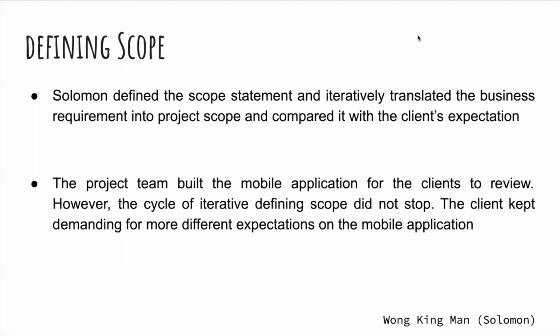Thank you, Oswald. I am Working Man Solomon, and I will now discuss the defining scope process in the business case review. Although the previous project manager, Billy, did not define the project scope, he had worked with clients and project team members to create the project charter. With the project charter and requirements documentation, Solomon defined the scope statement and iteratively translated the business requirements into the project scope and compared it with the client's expectations.